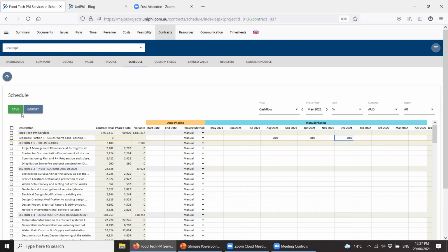And then there's the ability to fill these down into other sections. If I tick those, I can fill them down into the other sections that are common with that profile and start to build up my cash flow forecast from that perspective. And with effort, probably more on the start and end dates, and then selecting a relevant linear-based or S-curve-based methodology for phasing that information out.